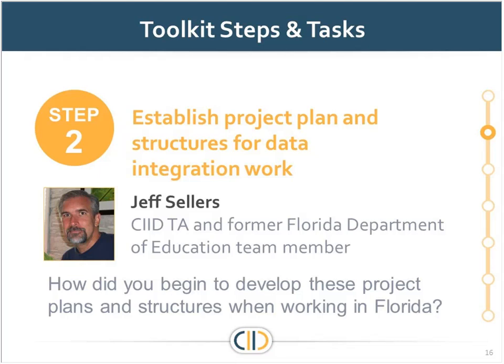So it wasn't that they had to be part of every discussion every time, but when it came to identifying data elements that needed to be included, or what those definitions were, or reviewing the ETL, or reviewing the results of test scenarios, all these kinds of things occurred at points through the project, and we were able to schedule that time with the various data sources, the contributors, and then engage them. And they were able to prepare and schedule for that time as well.